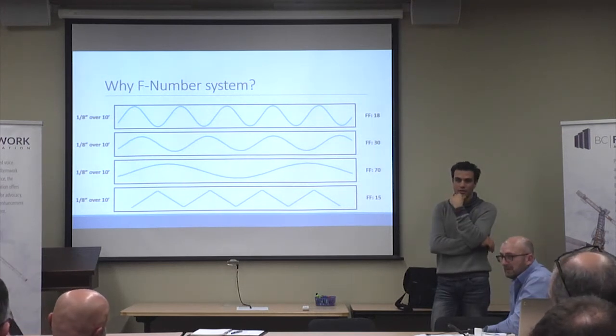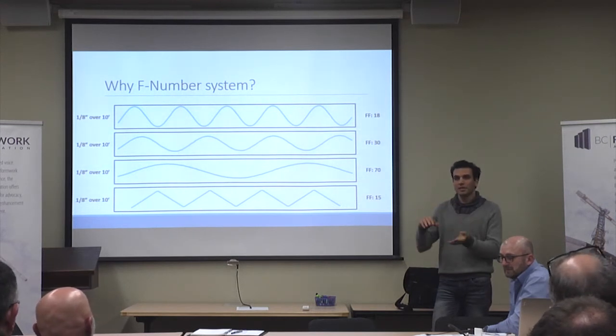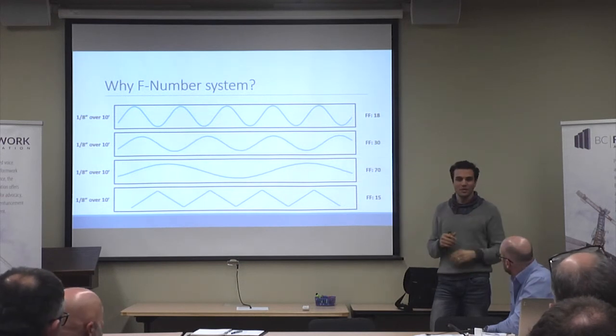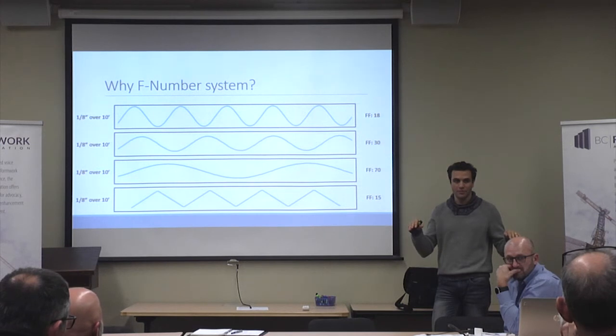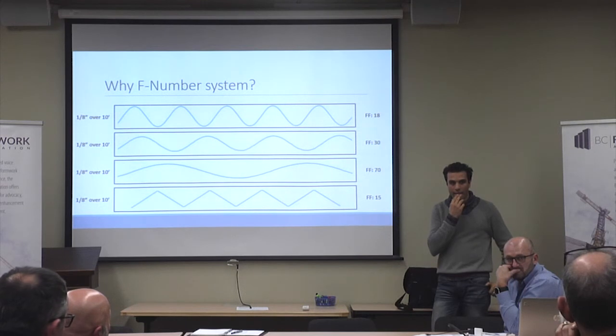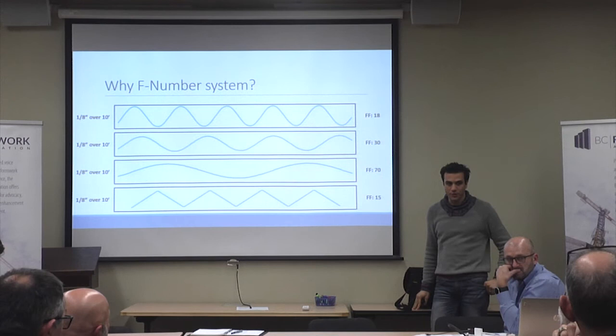It's usually 25, 35 or 25, 30. So FL is higher. Well, I mean, this is weird. We're not so concerned with level. But what's actually happening right now, you're more concerned with the level, because 35 means more quality and levelness. Well, that's just a correlation from straight edge to the F number. It's just a correlation between them. In reality, we don't really look for it. We can still install a floor like that and meet our standard. So FF is more important for you guys. 100%. Yeah.